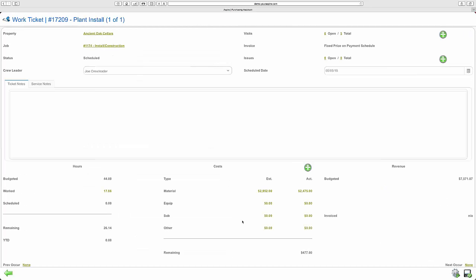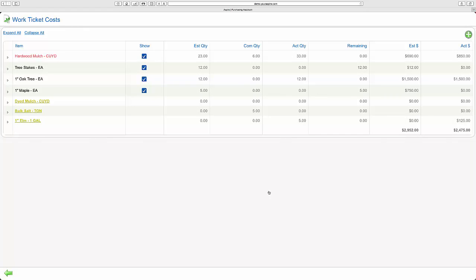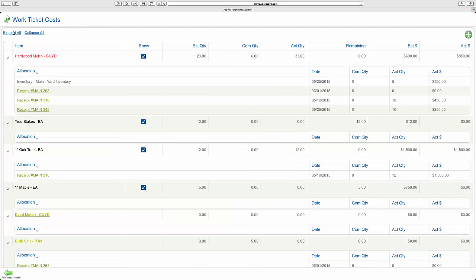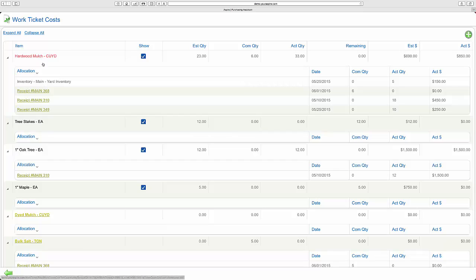Purchasing and the ticket are integrated. Every job has a labor as well as a materials budget. You apply by purchasing or through inventory allocation materials to the job so that at any point in time managers can develop a pretty consistent percentage work completed on any job and take appropriate actions.